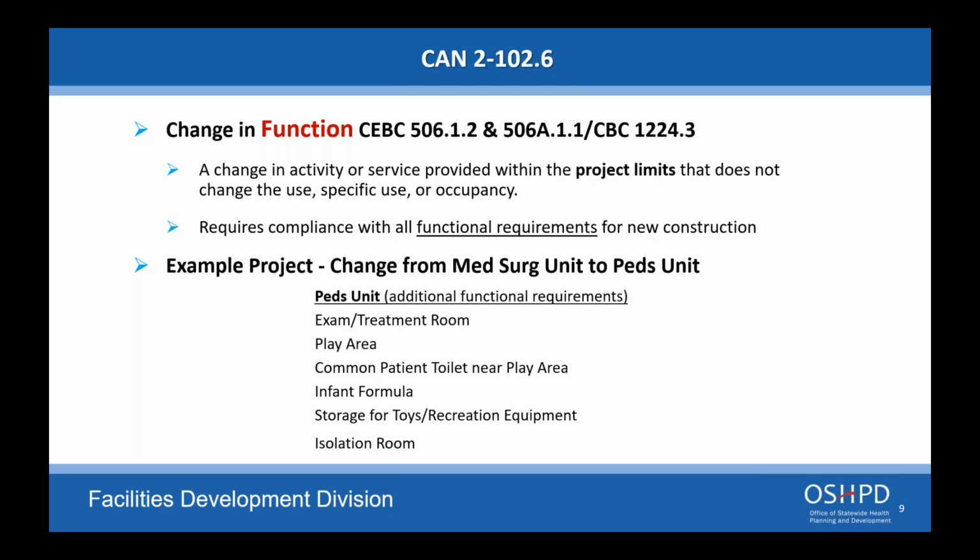If you're just replacing the head end, that is your project. You're just replacing the head end unit. So no, it does not need to bring it up, it's not going to trigger everything. Basically how we look at it is if your head end unit is going down or failing, you need to replace it. We're not going to require the entire facility be upgraded to the current requirements. You're just going to replace that piece of equipment that is failing.